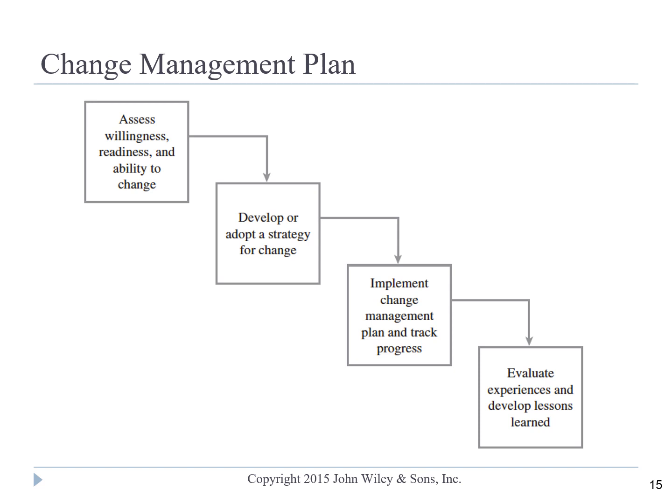Like most other plans that we have talked about, you first start by assessing the willingness and the readiness and the ability of the organization to deal with change. How big of a change is this? And then accordingly develop or adopt a strategy, or sometimes a combination of strategies, for dealing with the change.